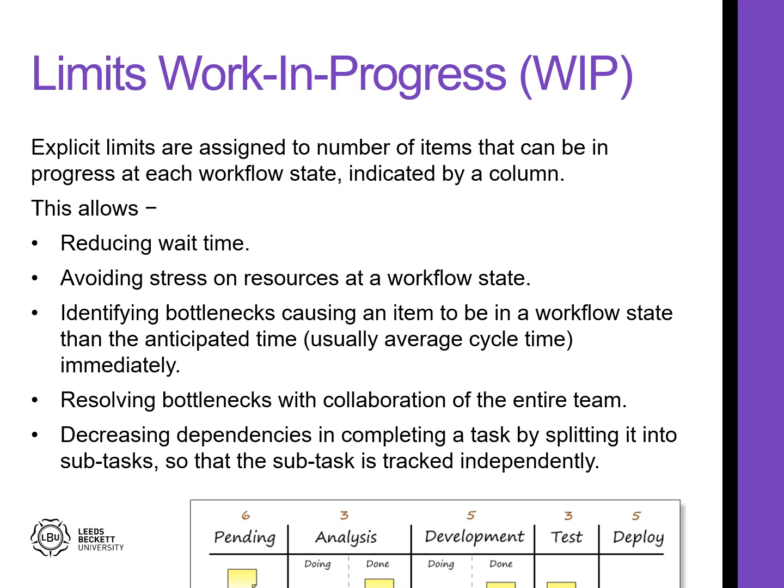There we go. It limits work in progress, so you don't get a build up in one department waiting for the next department to clear up, to send products to it. So it will limit the number of products that are in work in progress, thus reducing wait times, because it's a pull system.